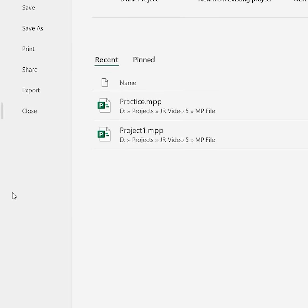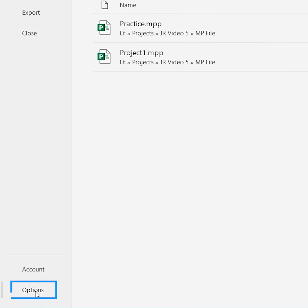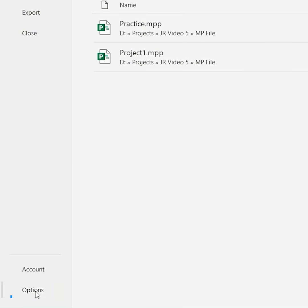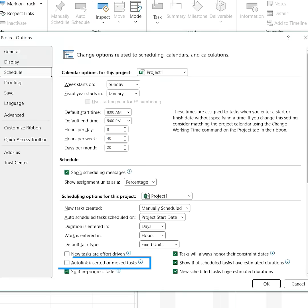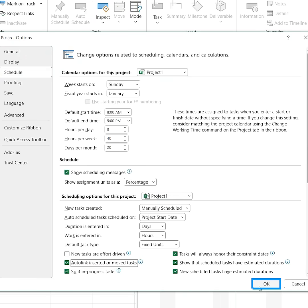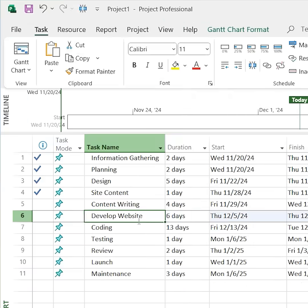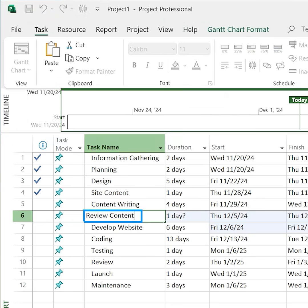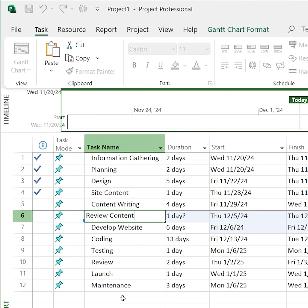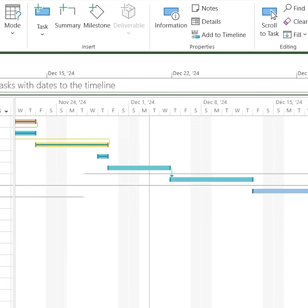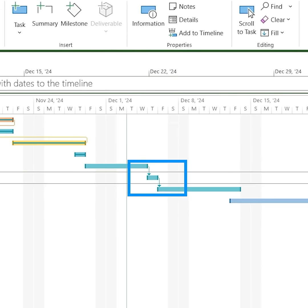Here's how to turn on auto-linking. Go to File, then Options, then Schedule. Check Auto-link Inserted or Moved Tasks, and click OK. Now when I add a review content task between drafting and development, the links form seamlessly and my schedule stays intact.